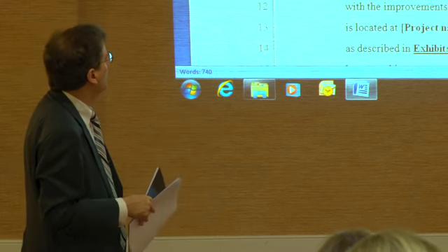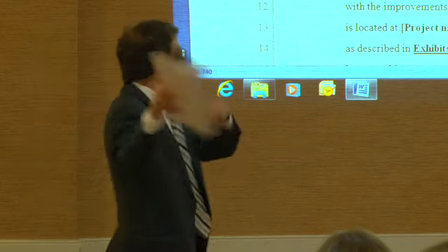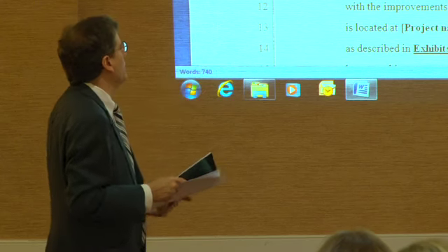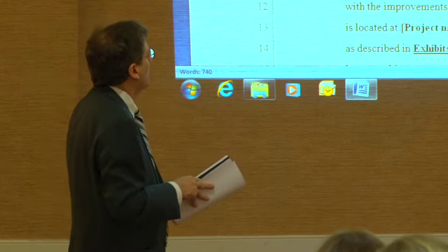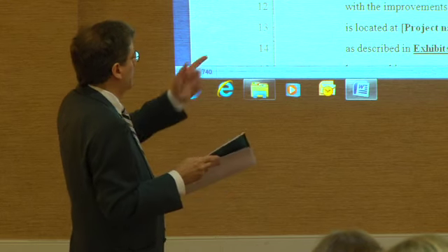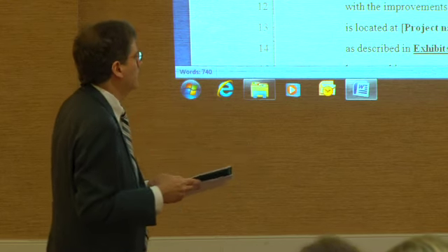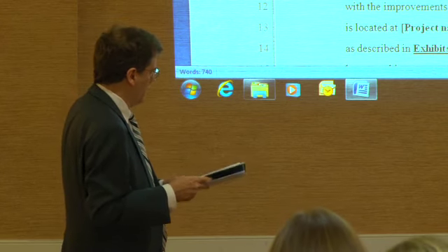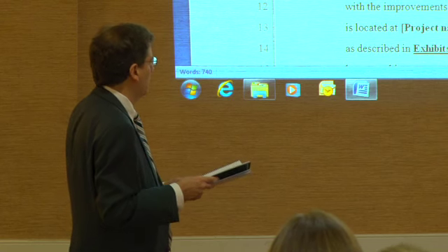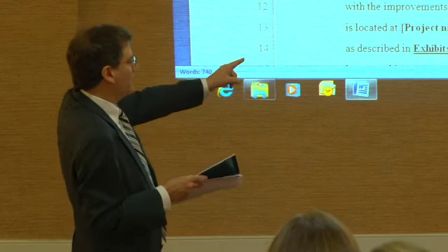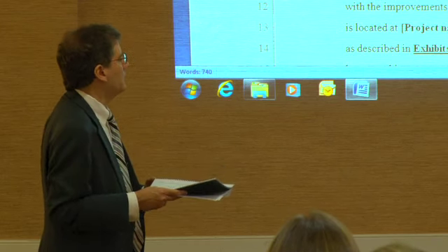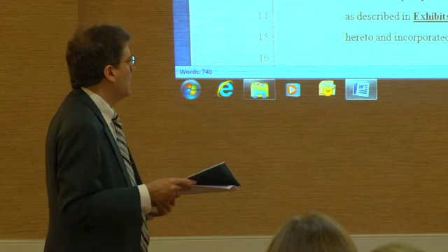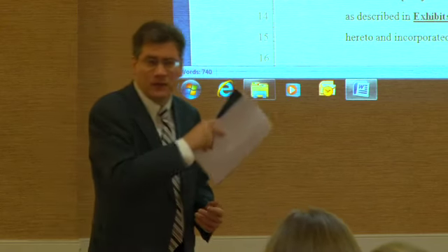Moving through the lien claim, the name and domestic address of you, the claimant, is paragraph 3. Here's what we furnished, but let's stop and read this one. Claimant furnished labor, materials, fixtures, whatever. General description of materials, you punch that in. Obviously, this is a Word document that we use as a template. On that certain parcel of land situated in Maricopa County, sought to be charged together with improvements with the lien hereby claimed. Said property is located at. This isn't necessary, but we put it in anyway, the project name and street address, and has a legal description described in exhibits, what have you, which are attached here too. That you have to have.